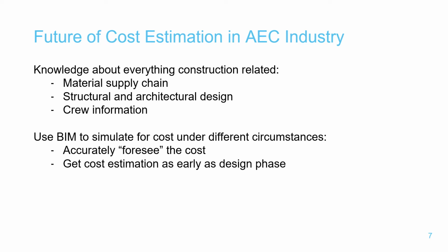Material price, transportation cost, on-site labor cost, not to mention that price varies between different contractors and installation methods. The more inclusive the database, the more accurate the cost estimation. Moreover, owners and designers can use this kind of BIM model to easily simulate costs under different circumstances, such as changing combinations of contractors. Therefore, they can obtain a more accurate budget from the model as early as in the design phase, and potentially use the result for decision making.